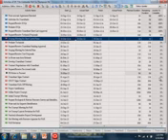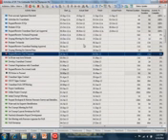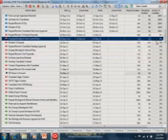Otherwise, like all of these ones that are grayed out here would be because the default in Primavera is to be set to duration percent complete, which you don't enter. It's calculated as a percentage of how much of the duration that you've used on the activity. So that's why they're grayed out. It's just in this example, I didn't have it set to physical percent complete, which is most likely what you guys will have. You'll have yours set to physical percent complete, I would think.